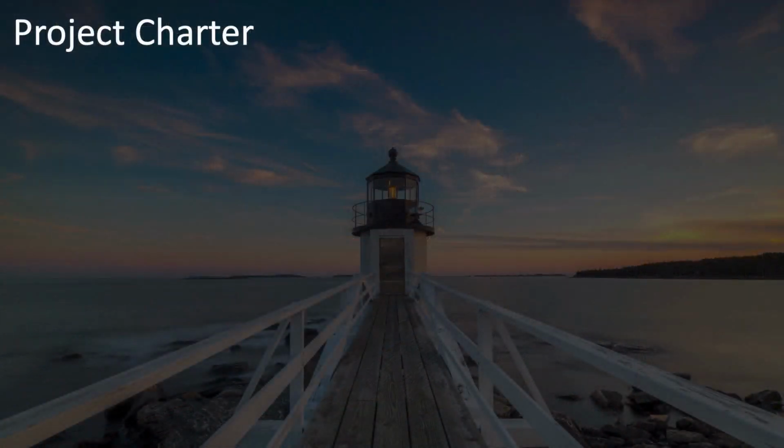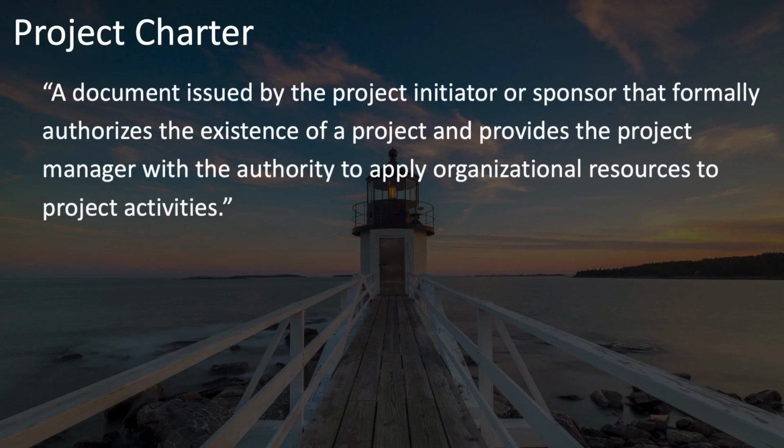How much do you remember of the definition of the project charter? What are the key elements of the definition? The project charter is a document issued by the project initiator or sponsor that formally authorizes the existence of a project and provides the project manager with the authority to apply organizational resources to project activities.